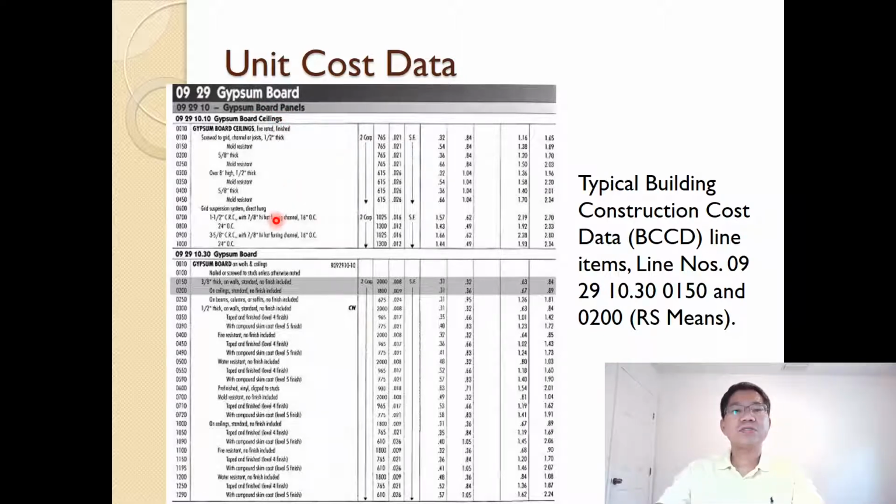And for the cost data, as you can see, for each item, what they have here in the first column is basically the labor, how many people we have, and then we have a daily output. We have the unit of measure, so it's very important to understand the unit of measure, and then the material, labor, equipment cost, and the direct cost, and the total cost, including overhead and profit. We will do that when I walk through problem 2 of today's lessons.